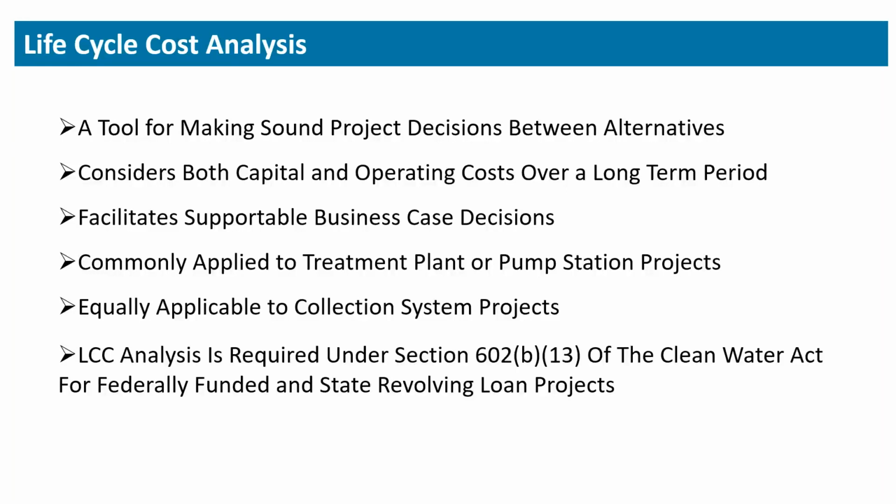There's another driver here besides wanting to do the right thing from a business point of view. It's legal, and that is captured by the citation in my last bullet, section 602(b)(13) of the Clean Water Act. What that section says is an LCC must be conducted and drive the decision when state revolving loan funds are used to finance a project.